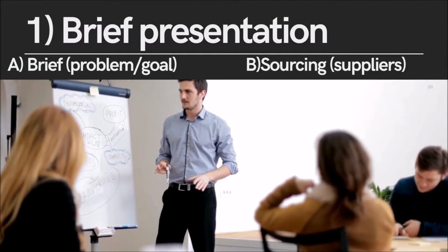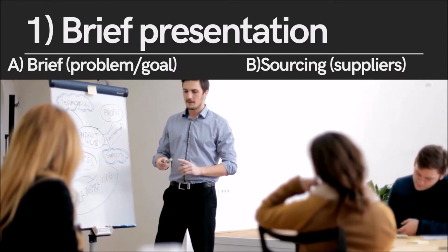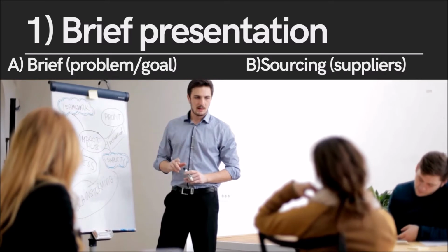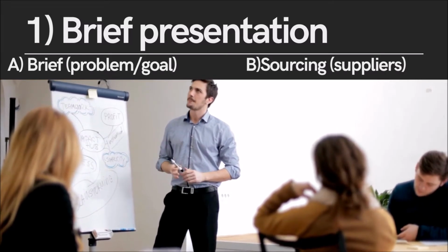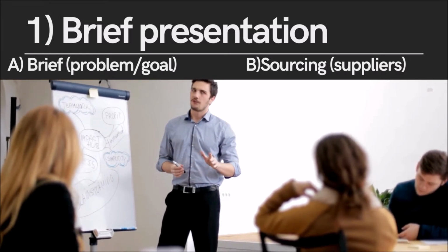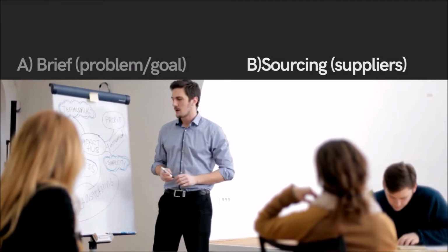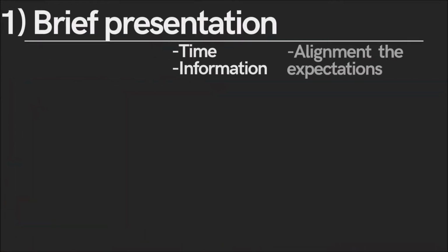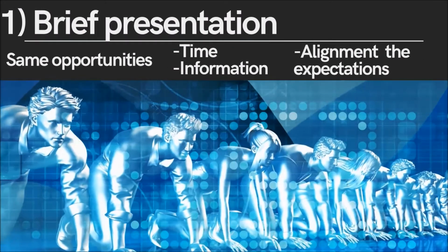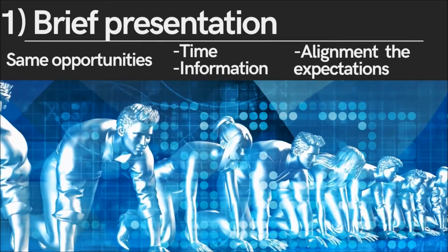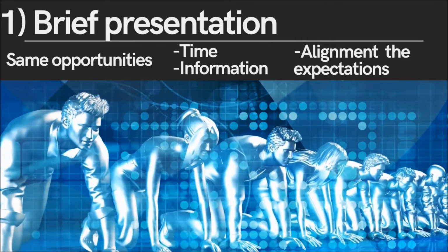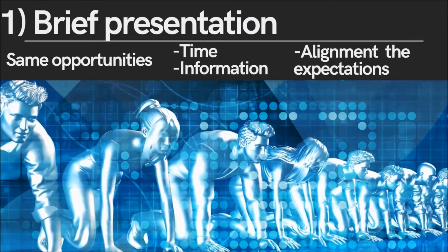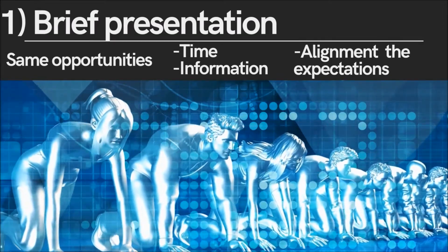Once you have defined the brief and found potential suppliers, the next step is to present the brief to your potential new commercial partner. To get the best proposals from your suppliers, you need to be sure about giving the same chances to all the participants. All suppliers have to receive the brief at the same time.